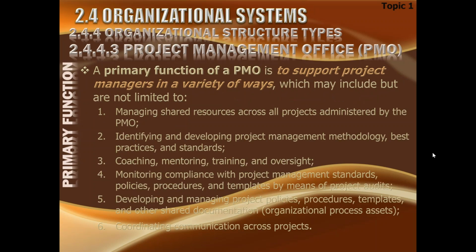So the primary function of the PMO is to support, as I said earlier, the project managers in a variety of ways, and that could be managing shared resources across all projects administered by PMO. If there is a dedicated resource for a project, that is the project manager's responsibility to manage it. But if there is a resource which is shared among 2 or 3 projects, then PMO will manage it. Identifying and developing project management methodology, best practices, and standards, this is PMO's responsibility.